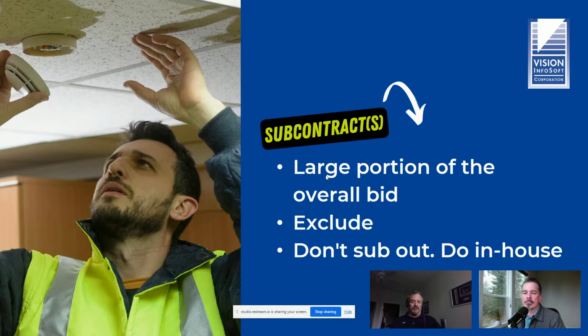But again, the thing I worry about with a large subcontract is, let's say the fire alarm again is $250,000, and one of your competitors is getting a subcontract price from the same people, or for a different customer, for 150,000. Then you're not competitive, and it's totally out of your control. So it's a big red flag when a large portion of the job is being subcontracted.